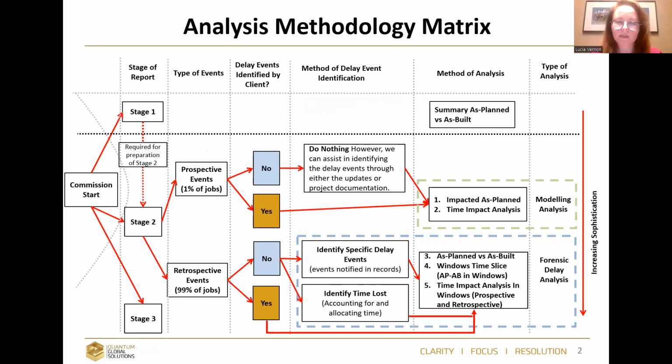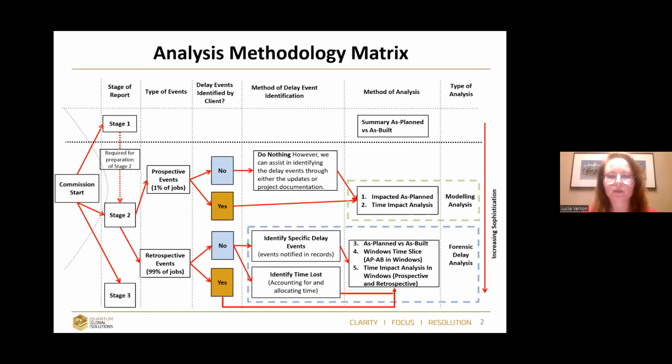So when I start analyzing the project, I look at the project as a whole. For example, if I'm working on a skyscraper, when you look at the project, you know where the critical paths will go across. You have to have a foundation, it has to go across the substructure, across MEP, and the facade is also very important. So what I'm trying to do is to summarize the project, and that's the time when you will look at the baseline. You will look at the baseline programs: is it correctly logic linked?